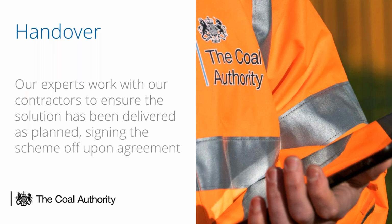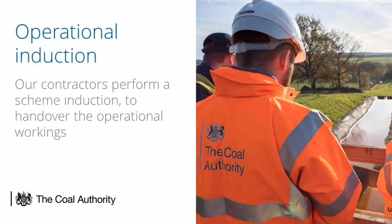Backing up all this, the operation and maintenance manuals and the health and safety files, which we review to make sure they contain all the appropriate documentation. Once we're happy with that, and we've gone through the usual sort of snagging lists and things like that, the scheme's formally signed off and becomes an operational asset for the Coal Authority.